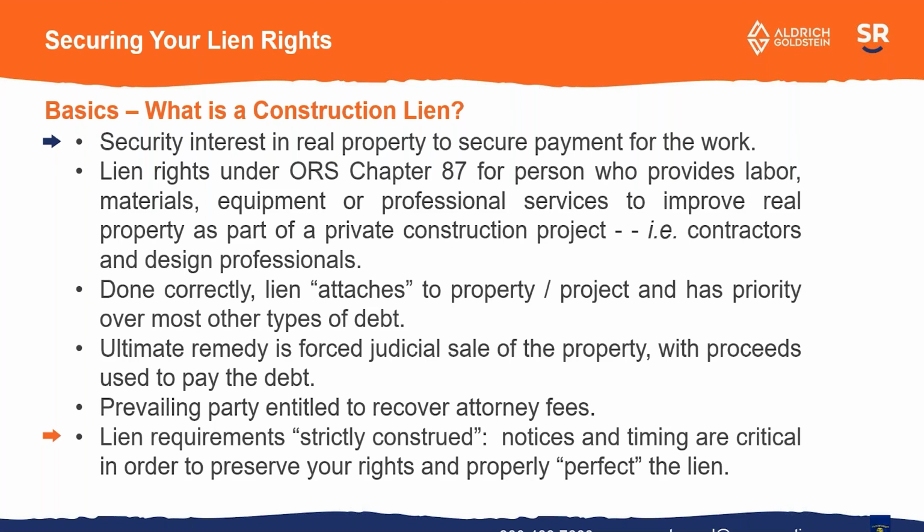The ultimate remedy for a lien claim is a forced judicial sale of the property. They actually go and sell it on the courthouse steps. Now, that rarely happens, but what it does give you, again, if you do it right, is a lot of leverage to ensure that you get paid.